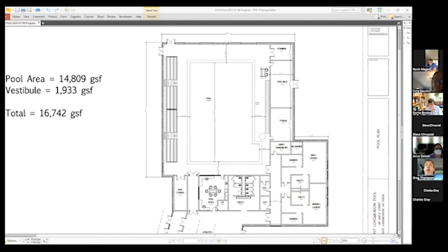Just square footage times, out of the air. It's a $15 million project. We're going to add 25% in lane and additional water. I don't know, it's an estimate. I don't really know how much more it's going to cost. It's going to be in the millions to go from 6 to 8. I don't know if anybody wants to dispute that.